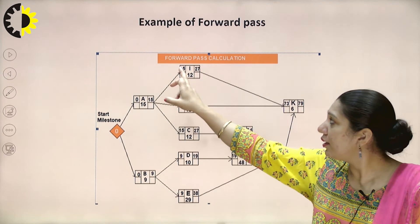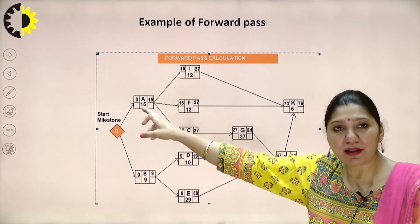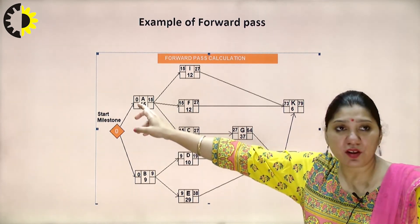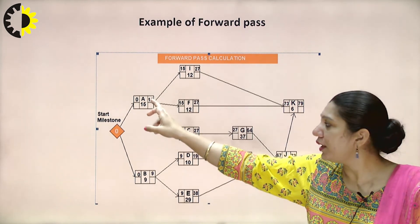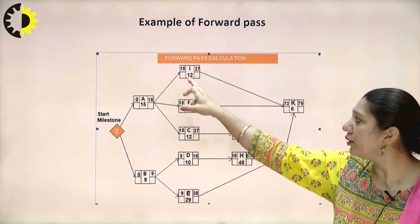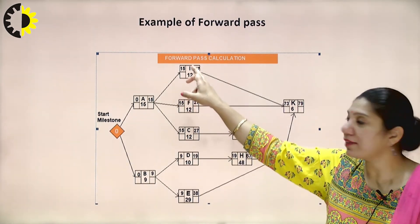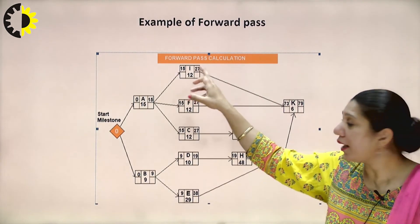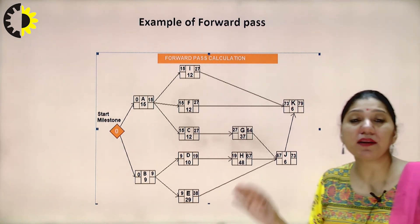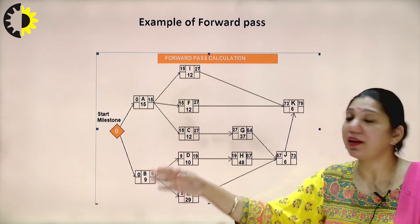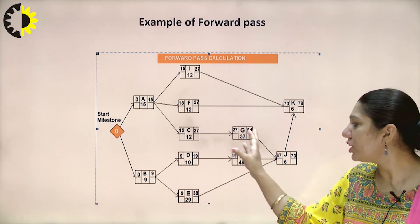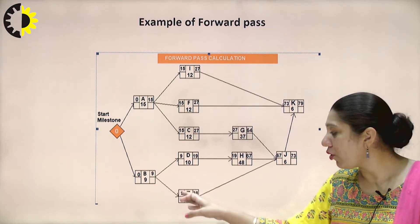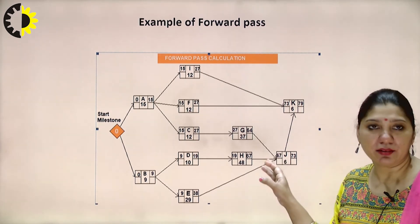The forward pass diagram shows early start and early finish for each activity. Initially taking 0 value, activity A takes 15 days, so 0 plus 15 equals 15. That 15 carries forward to the next activity — activity I takes 12 days, so 15 plus 12 equals 27. All activities — A, F, C, G, B, E, D, H — have their own durations, and the previous cumulative value is added to the current duration and forwarded.